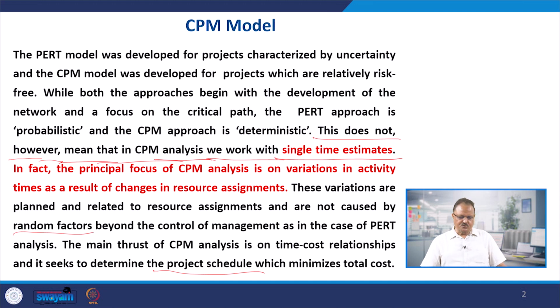If you are going to reduce the project duration by crashing some of the activities and finding the most optimum time within which all the activities can be completed, what will happen? Your total time period involved in completing the entire venture would be going down. As a result of that, direct cost will increase because it has an inverse relationship, but indirect cost will come down because it has a linear relationship.